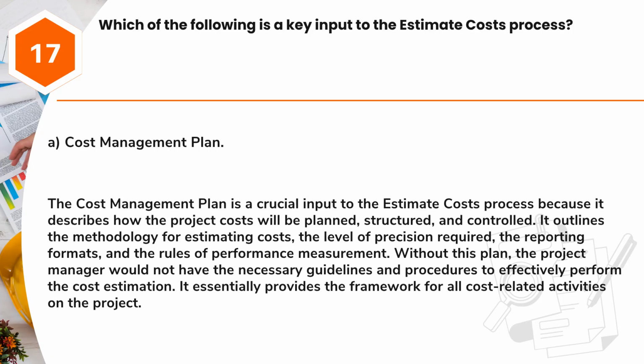The cost management plan is a crucial input to the estimate costs process because it describes how the project costs will be planned, structured, and controlled. It outlines the methodology for estimating costs, the level of precision required, the reporting formats, and the rules of performance measurement. Without this plan, the project manager would not have the necessary guidelines and procedures to effectively perform the cost estimation. It essentially provides the framework for all cost-related activities on the project.